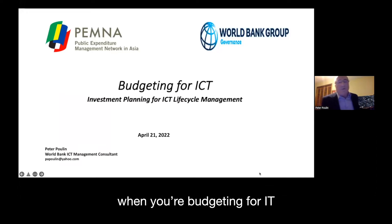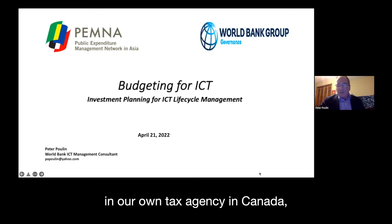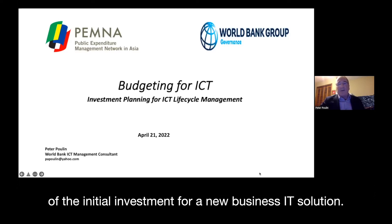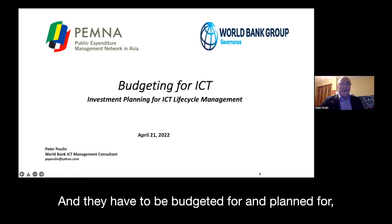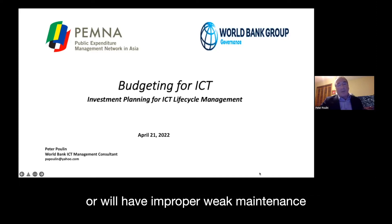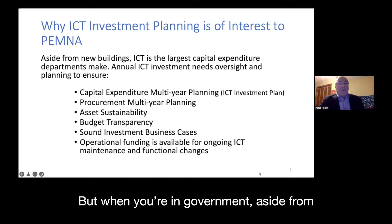I've seen often — not just in the developing projects I'm working in around the world, but also in our own tax agency in Canada — that people think about the capital cost of the initial investment for a new business IT solution, but they don't understand that there are ongoing operational costs to sustain that solution. These have to be budgeted and planned for, or you'll build something you can't sustain long term, or it will have improper, weak maintenance and won't deliver the business value that was fully expected.